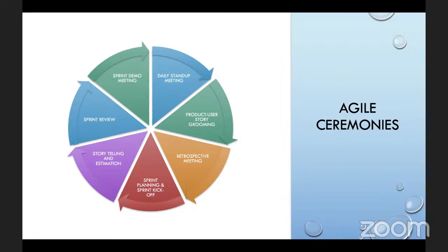But the idea of parking lot is that if you have something to discuss or something to talk about, and it's not part of your status, when we go into parking lot, you can share with us whatever you want to talk about. The idea is that we want to be able to free all the other members so that they can move on and go and do their work. They don't have to be on the call to listen to all the stuff that you want to talk about, right?